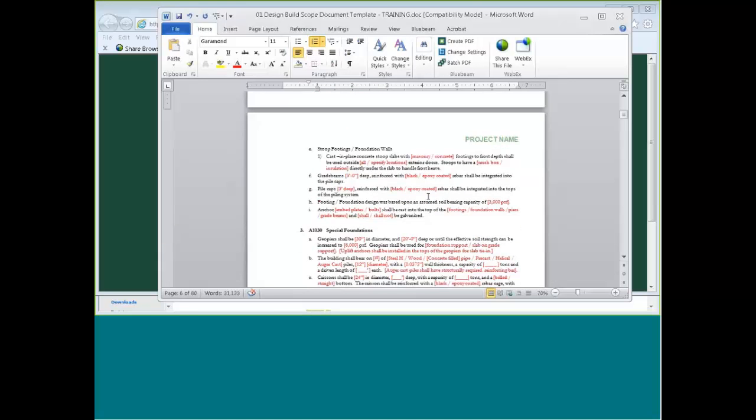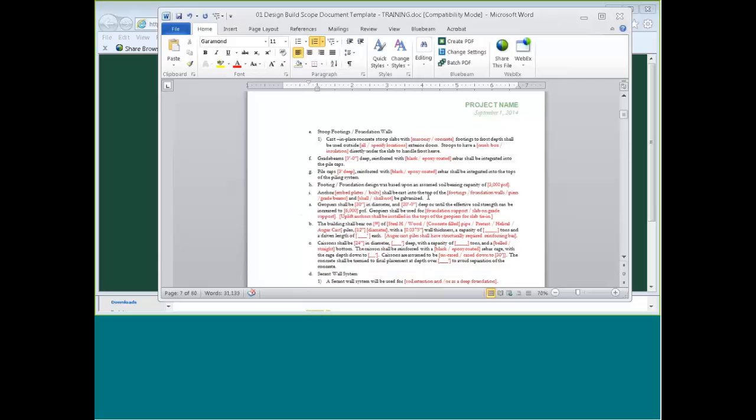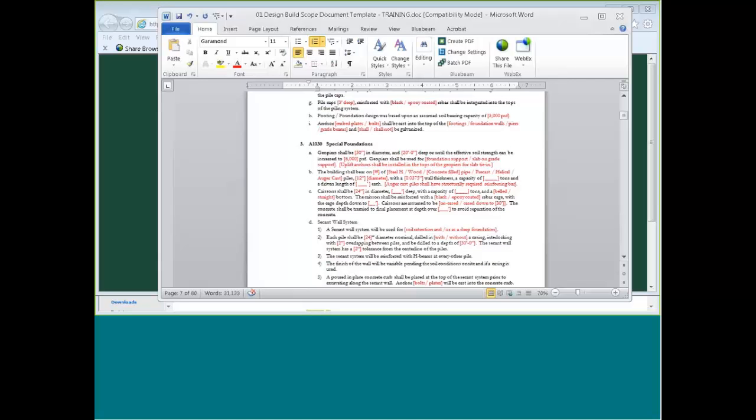It's pretty self-explanatory. The other thing that I like to do with this document is it almost serves as a checklist with your estimating template as well. You're going through and maybe with your caissons, you forgot that there's bar that sticks out that ties into your footings. And maybe from a conceptual estimate standpoint, you didn't have that in your number. And you're like, oh yeah, I need to include that. There's some language in here that might remind you of that. So it's even good just to read through some of the information. And maybe you don't want to tell your owner all this information, and in that case you just delete whatever sentences you don't want to show them.